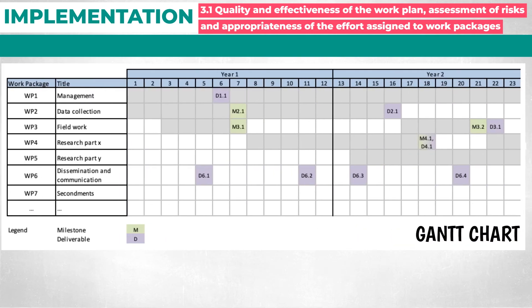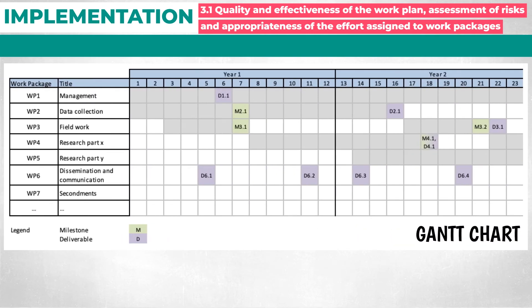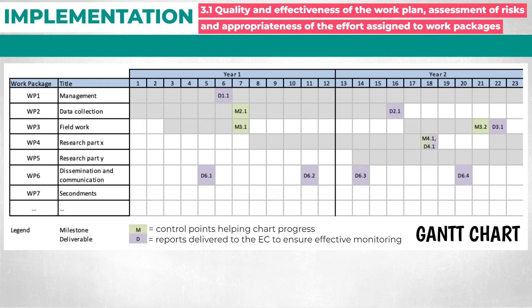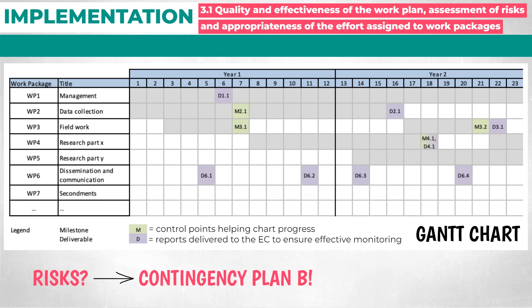Prepare your Gantt chart, where you indicate the timing of work packages and their major components, such as deliverables, milestones, secondments, and non-academic placements. Identify possible research-related but also non-research risks to successful implementation, and your concrete Plan B — the so-called contingency plan — consisting of mitigation measures.